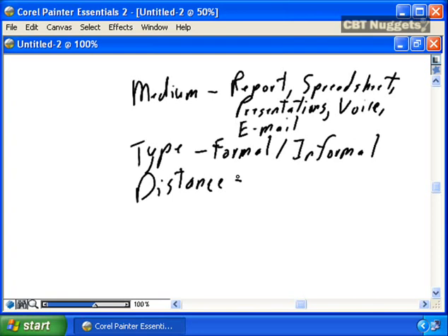You need to find the appropriate type of communications that's going to allow you to communicate over the distance. Sending email gives you the benefit of instant communications while still allowing it to be stored and processed the next morning when the person is awake after being asleep based on the 12-hour distance. So distance and time zones are also issues that you have to be aware of as you're putting together your communications process and your communications management plan.